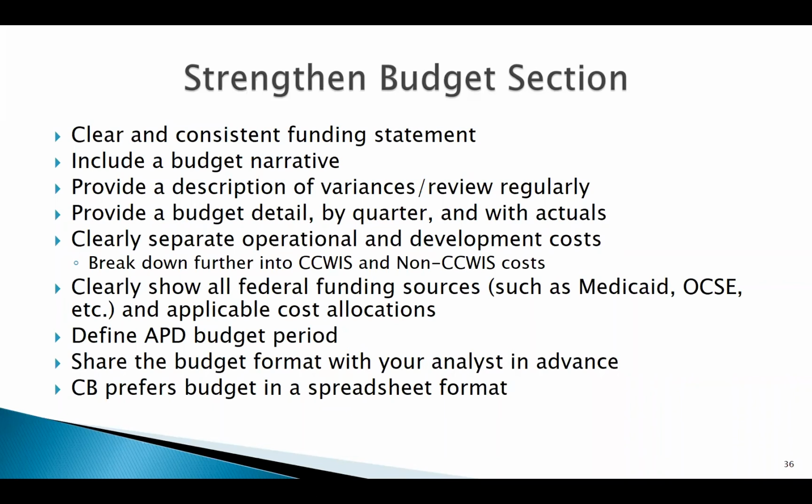Share your budget format with your analyst ahead of time, and CB really prefers spreadsheets. We see agencies that like to put columns or charts in their APD document, and it's so easy for things to get out of sync, for numbers in your chart not to be updated when changes are made on the spreadsheet or vice versa. Most of the time we need to go through and check numbers and make sure that we're coming up with the same figures. It just saves time if you provide us the budget in a spreadsheet.